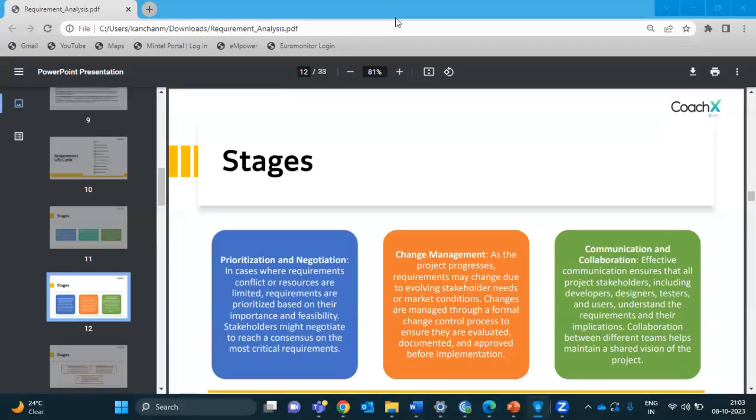If they say no, we can't, wait maybe 15 more days to do this, maybe you don't do that, right? So there should be a proper change management in place where you analyze or assess the change requested, check the feasibility. If changing something would not majorly affect your entire project, get the approvals and have it all documented.